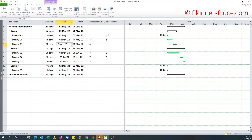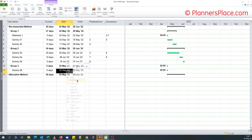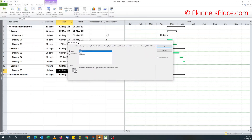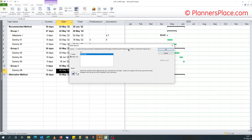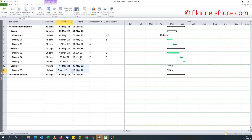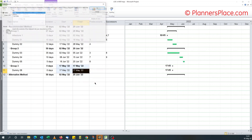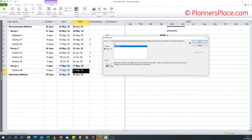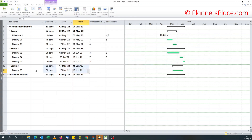To do that, you go to dummy two, right-click and copy cell, come back to dummy eight's start date, right-click, paste special, and in the paste special dialog you click paste link, then click OK. Then go to dummy four, copy the finish date, come to dummy eight, paste special again, paste link. Dummy eight now has a duration assigned to it, starting from the start date of dummy two to the finish date of dummy four.